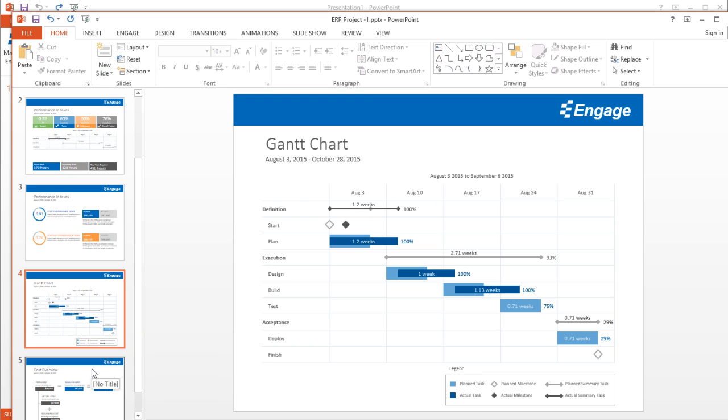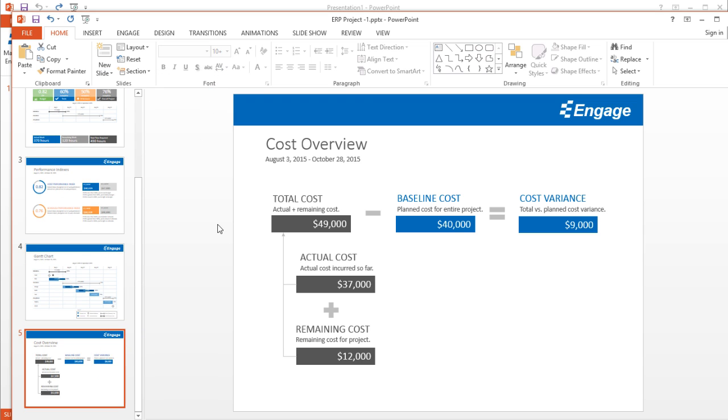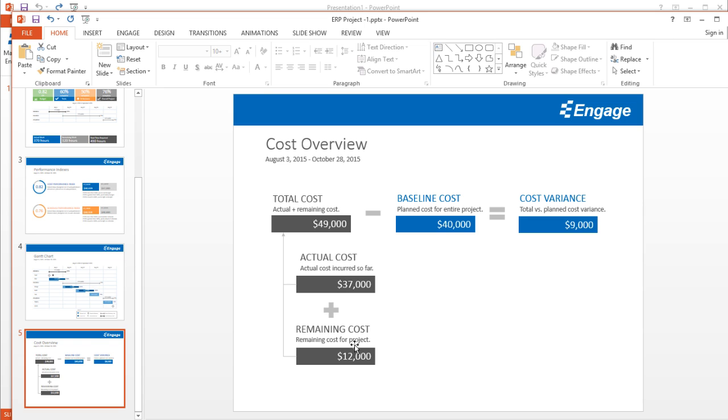The last slide here is the cost overview. If you recall, the baseline cost was $40,000, the cost variance was $9,000. The makeup of that total cost was a function of $37,000 of actual cost incurred so far, plus the remaining $12,000 for the $49,000. This entire presentation is created based on the data that's already in your Microsoft Project file.